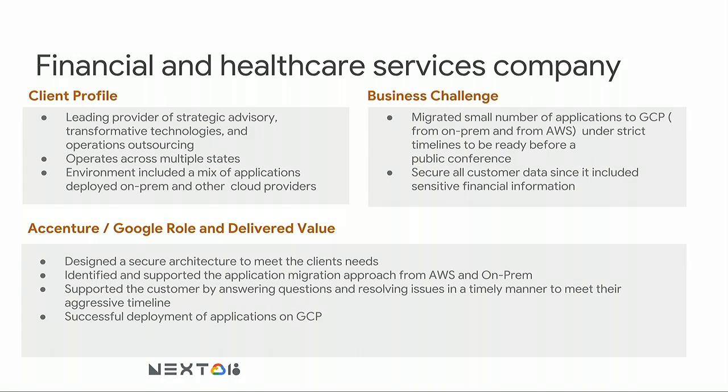Are these applications standalone? Can they function on their own? Or are there other dependencies? So if I go and flip the switch from A to Z, and then these applications, once they go to the cloud, is that okay, or are there other things that I need to worry about? Turned out that one of these applications was not the right application to migrate because there were lots of dependencies that they were not aware of, right?